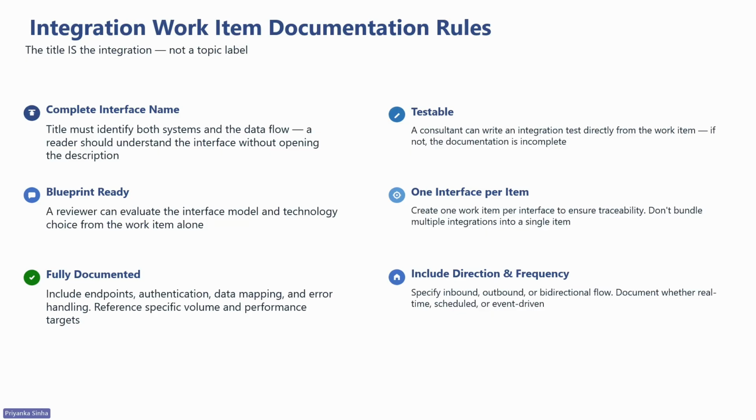And the sixth one is include direction and frequency. Is it inbound, outbound, or bidirectional? Is it real time, scheduled, or event driven? So this is essential context. Now let me show you what good and bad look like.